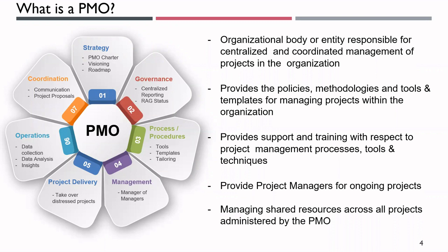At the same time, the PMO is also responsible for creating and standardizing templates. One of the biggest problems we see in projects is that, let's say you and I are project managers. You might be using template A in one format, and I might be using template B in a totally different format. So it's the role and responsibility of the PMO to make sure there's standardization of the template. Wherever possible, tailoring is allowed. Tailoring is customizing it as per the client's needs. So that is the third and most important role and responsibility of the PMO.